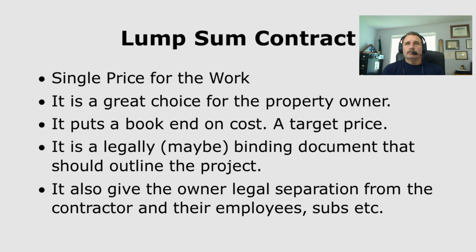This is generally outlined, certainly with mine, by doing a very detailed scope of work that is actually part of the contract. It becomes an addendum to the contract. Basically, the contract outlines the legalese, and the scope of work is the counting of the nails, as I like to say. It defines what the work is going to be and how much it's going to be.